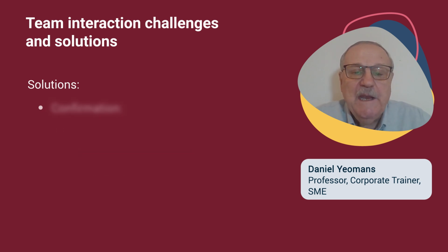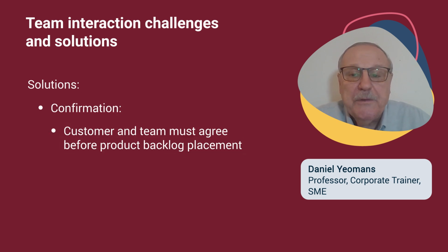Finally, the confirmation is the big challenge. The customer and team both, and I emphasize both, must agree with the entire user story to include the role, need, value, and solution before the user story is prioritized and placed in the product backlog.